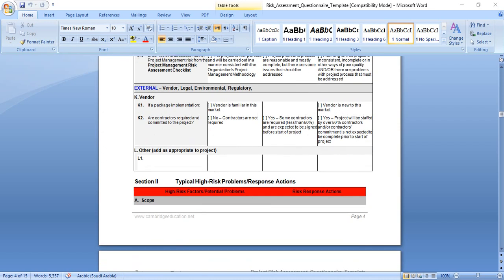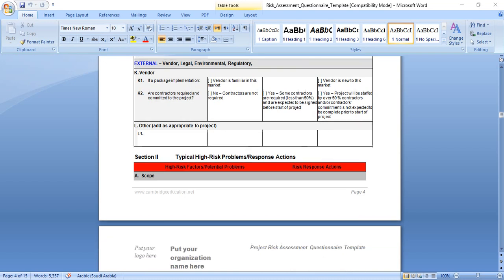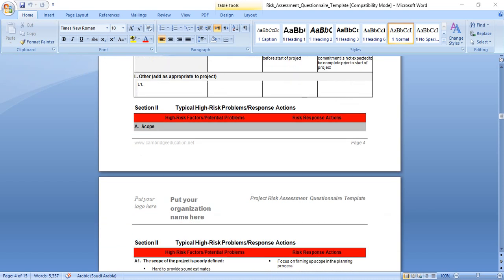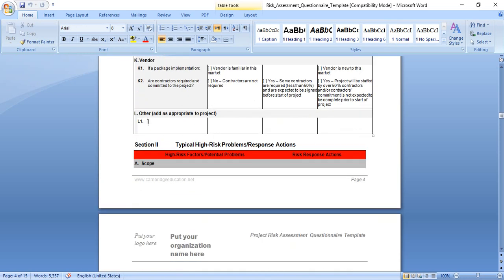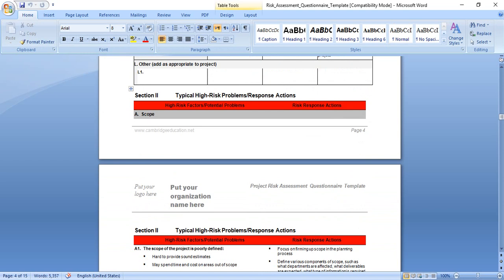External factors, for example vendor, legal, environmental, regulatory, or government. If the package implementation vendor is familiar in this market, low risk. Vendor is new to this market, this will generate high risk. Are contractors required and committed to the project? No contractors required, this is low risk. Some contractors, for example less than 50 percent, medium risk. Yes, project is over 50 percent contractors, this will generate high risk. You can add any other items or questions, and based on the answer for each question, you will know if the risk is high, medium, or low.